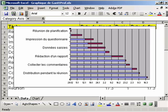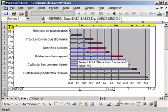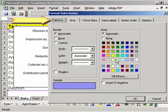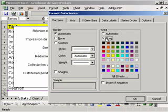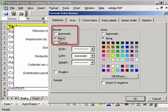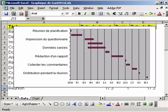To finish, let's double-click on the first data series to display the Format Data Series dialog box. In the Patterns tab, we select Area None and Border None. This makes the first data series invisible.